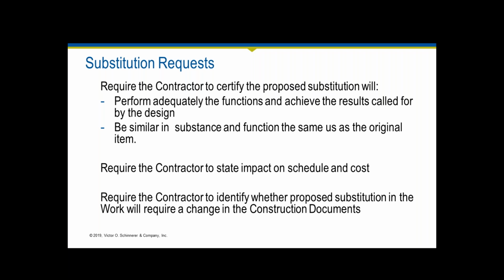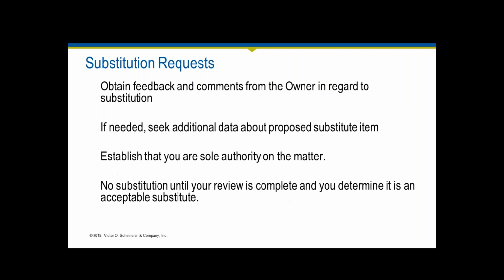And this is oftentimes the challenge for firms who are reviewing substitutions, in that the substitution may well be acceptable or beneficial, but there are other changes that need to be made to accommodate that, and that requires services on your part. And so how do you get paid for that? Is that adequately planned for? Oftentimes this is an additional service, but it is on you, the design firm, to know what your services say. The standard form documents anticipate that this is an additional service that the owner will pay for, but you have to follow up with the owner and say, hey, this is an additional service that you need to get paid for. If you don't identify and act accordingly, then oftentimes this could be a loss leader for your services.